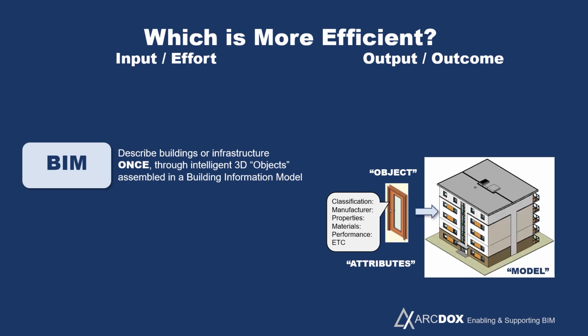Those components are then assembled within the virtual building, so you're literally constructing the building within software, and because every object has a spatial presence, the software can find if objects are clashing with each other, so the coordination becomes very easy.